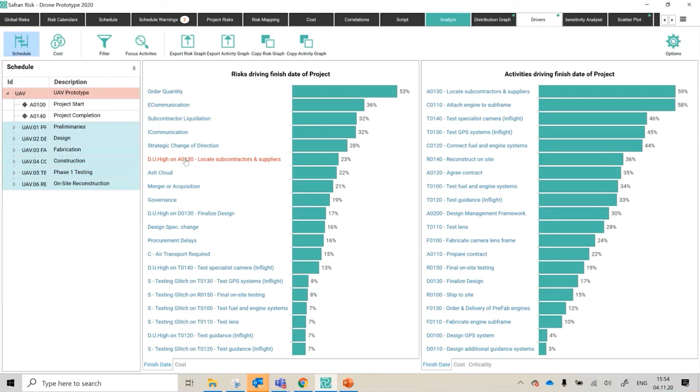So it's now something I'm aware of that I wasn't aware of before, and it could have very big ramifications, particularly if you're in oil and gas and you think you have to get everything built onshore where it's going to be cheaper before exporting offshore. You put in a bunch of risks but fail to recognise the estimating uncertainty effect, where they might actually have been your biggest risks all along. This is the kind of thing that would have helped you find that out and save you millions and millions of pounds in that kind of setting, perhaps. So I just like flagging that as a neat function that we have there.